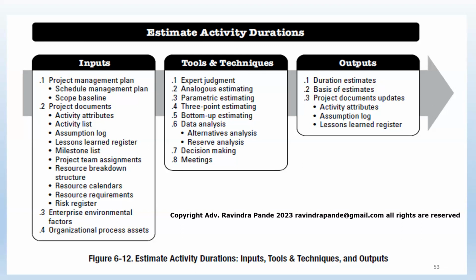In case the risk materializes, which reserves can I use to mitigate that risk, I might have kept in reserve. And this is how we normally address our eleventh-hour challenges with reserve analysis. It might be a schedule reserve, it might be a cost reserve, it might be a resource reserve. So there are these three reserves mostly used by project managers whenever there are some challenges materializing.